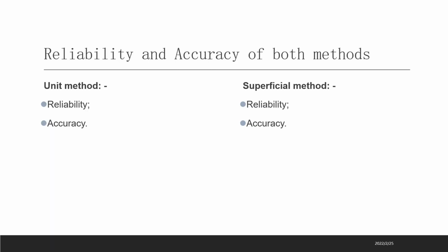The superficial area method is one of the easiest, fastest, and most dependable strategies to apply, mostly used by government agencies to provide broad parameters for their projects, such as primary schools and police stations. However, it lacks preciseness and should only be employed in very early phases of a project.